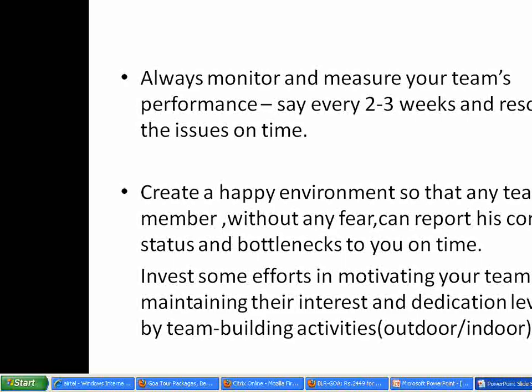And there is no set formula for a risk. You can use a risk matrix. Every company nowadays has a risk template. You can identify the risk, give the priority number, and give the impact. Priority can be medium, high, low, those types of things. So that's what I want to say.